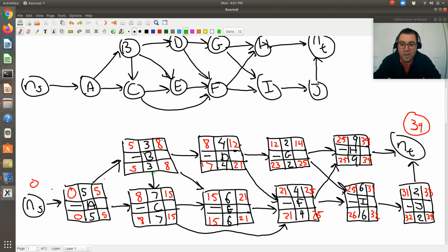Okay, so if my earliest possible starting time and latest possible starting time are the same, and my earliest possible finishing time and latest possible finishing time are both the same, the float, the flexibility I have for that activity to start and finish, is 0.